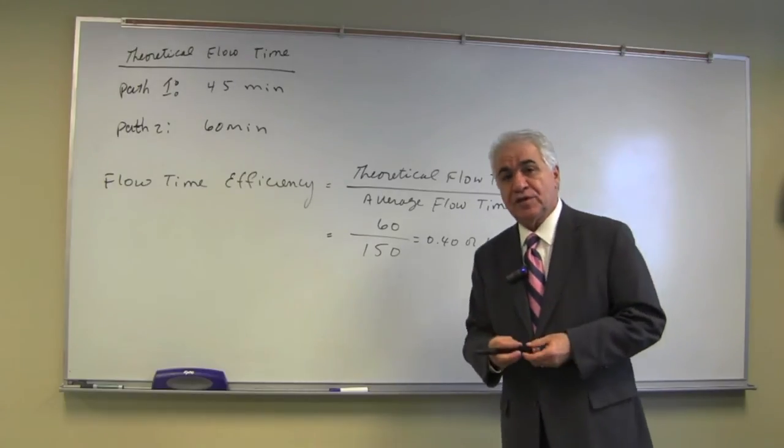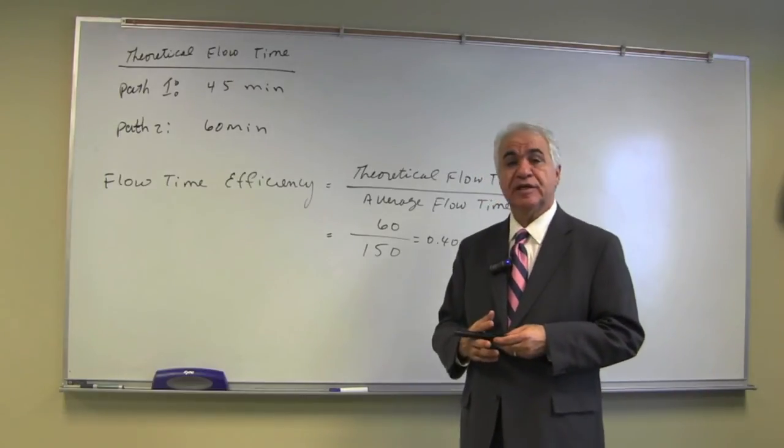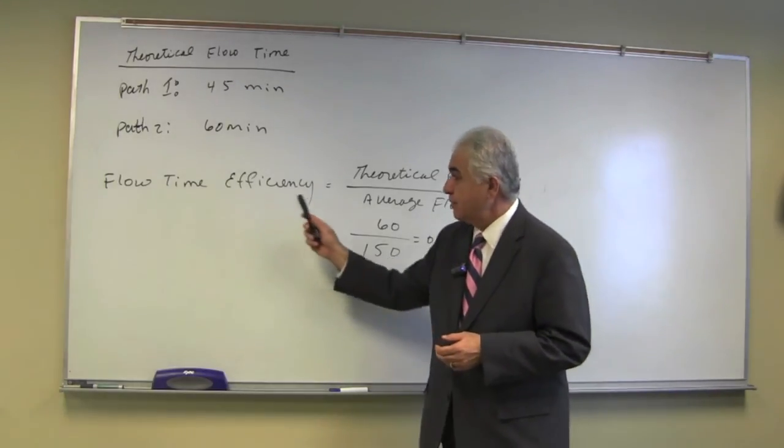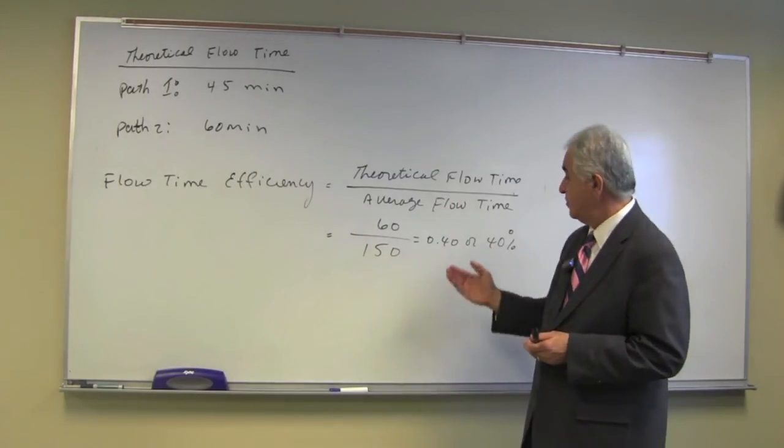So it's a good number to know, and it's an area that perhaps we want to consider improving. Flow time efficiency is theoretical flow time over average flow time, and in this example, it's 40 percent.